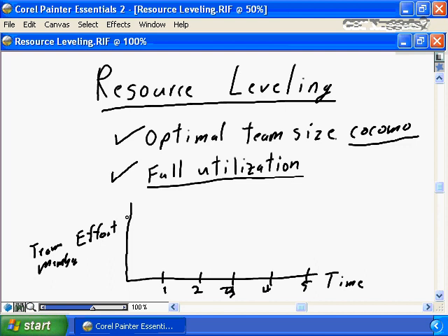And you're going to have a bar at some point in time, which is the optimal utilization for your team member, week in, week out, day in, day out. If you're working on a day-by-day basis, this number is going to be 8, or the reduction of 8 based on the utilization that we talked about earlier. So it's down to 7.6 hours per day.